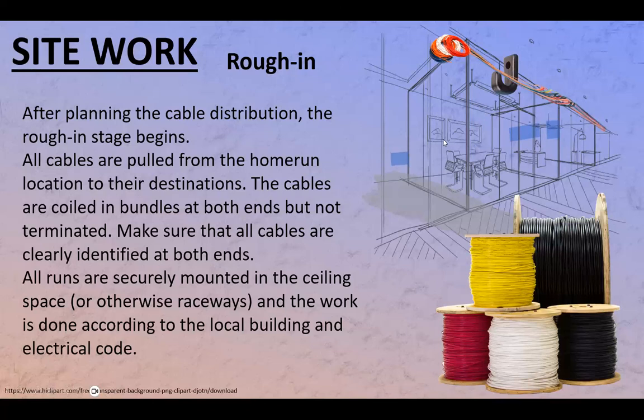It's probably the most efficient way of doing things, because this way you just concentrate on one task that needs to be done. You have one set of tools and you get into the rhythm and you do it. Plus, you need to pull some of the wires before more construction begins, like maybe drywall is going to be put in. Yes, it's still possible to pull the wires after the drywall is installed, but it's going to be more time-consuming, right?